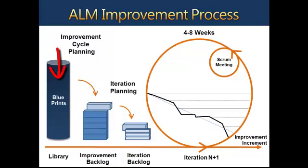The blueprints provide examples of valid improvement items that are leveraged to pre-populate your improvement backlog — for example, how to implement bug management, continuous integration, or source control with TFS. Once again in line with Agile concepts, a project is comprised of multiple iterations whereby prioritized improvement items are selected from the backlog for implementation. A completed item is expected to be evidenced in practice. In this case, the framework borrows from the concept of definition of done.